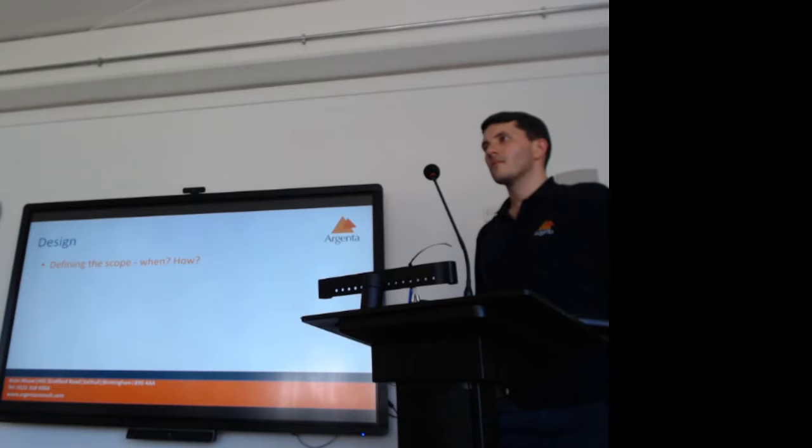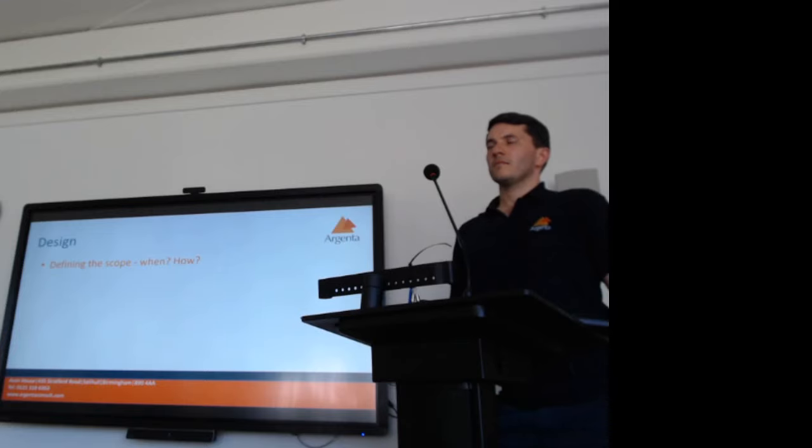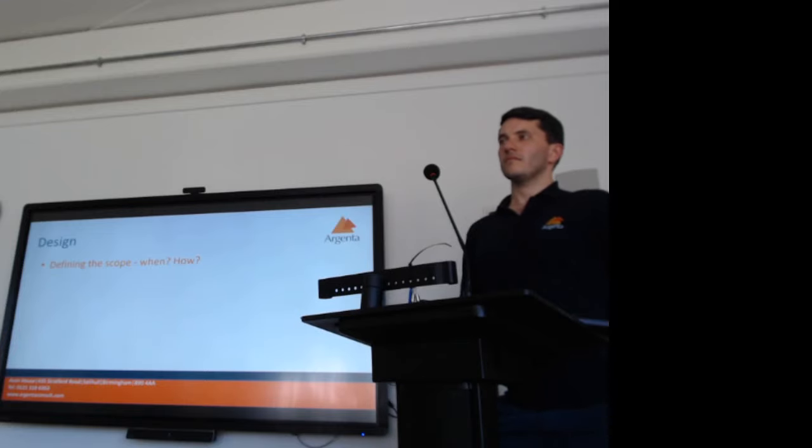Because I found trying to nail down a scope on technical detail just doesn't work. Frankly, when you're in the middle of it, they're going, well, this isn't going to work unless you put that button here. It's too late to go back. Well, the contract says. So I try and use that at a slightly higher level, the use case. I've started using use case diagrams a little bit more lately. You need to get a spectrum out of this, so that's the scope. Whatever I need to do to get a spectrum out of it is in scope, whether that turns out to be an absolute pig or as simple as a single VI.